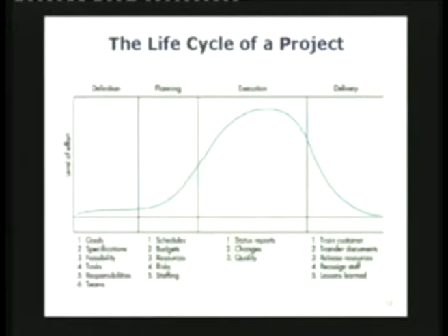Before you leave planning and go into execution, all the details must be laid out. Your CPM, critical path method, must be complete. You identified all the tasks and defined them. You define the work packages. Only after that can you assign the contract. You can go ahead and award the subcontracts and so on. That has got to be done right there.